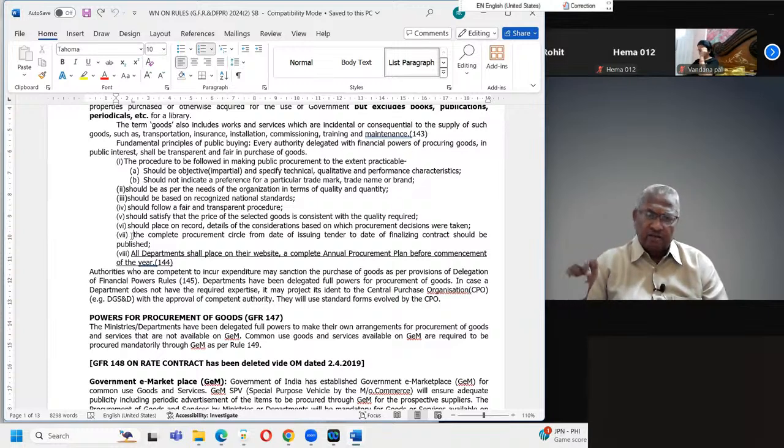टेंडर इश्यू होने का, दैट इज हमारा परचेज रिक्वायरमेंट, प्रोक्यूरमेंट प्लान, बजट सैंक्शन होना, इट इज सैंक्शंड, बजट अमाउंट कितना सैंक्शन होता है बाय दिस फर्स्ट और सेकंड वीक ऑफ मे, ये फाइनलाइज हो जाता है. देन फ्रॉम देन 30 days में हमें पब्लिश करना चाहिए, we are in need of procuring this many items, our purchase plan will be like that. So from then onwards, whenever you are going to purchase, that should be through tender or any other method.